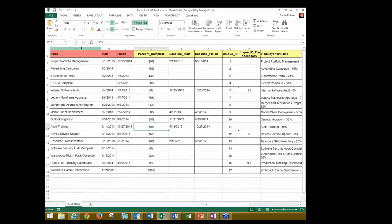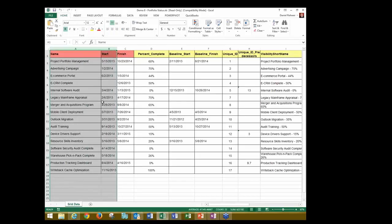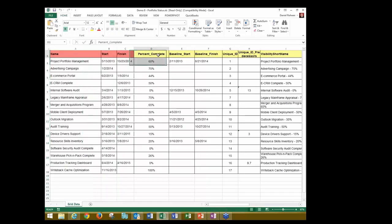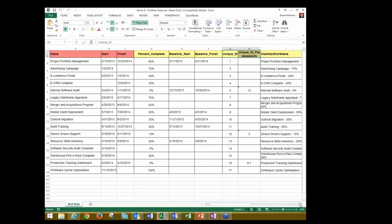Now, the Swimlane timeline only needs two fields, a name field and either a start or a finish field, to generate a Swimlane timeline. That's all it needs. Now, there are some fields that have particular meaning, and these are all described in the Quick Start Guide that comes with the download or also in the full user's guide as well in the appendix. But percent complete, baseline start, baseline finish for visualizing your baselines, unique ID and unique ID predecessors for visualizing dependencies.